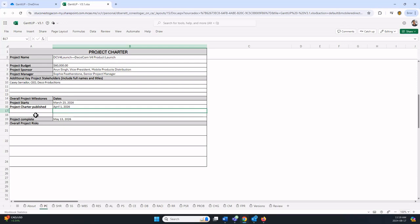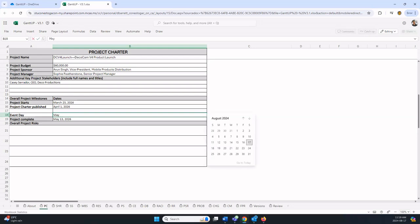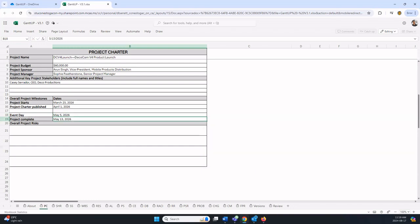If this is an event project, if your group assignment is for an event, one of your milestones should be the event itself. That is a key milestone within an event-based project. That could be something like event date or day, maybe scheduled for May 5th, 2026. It's not relevant for the DecoCam case study, I'm just showing you for example purposes.